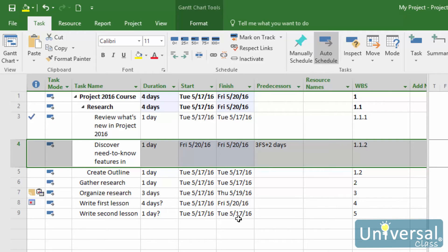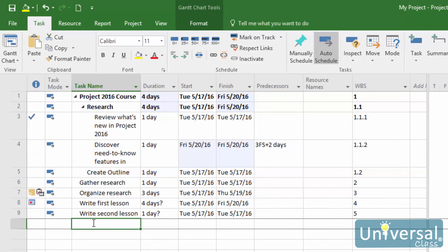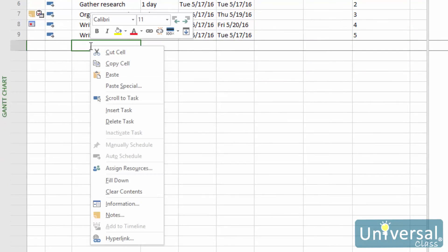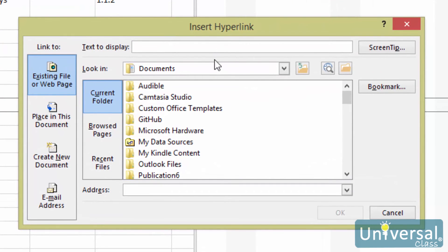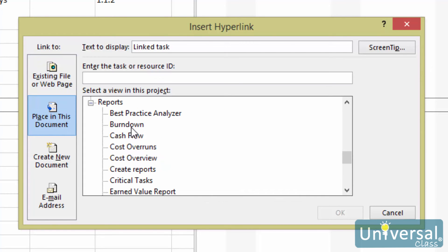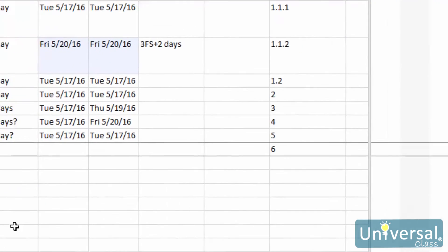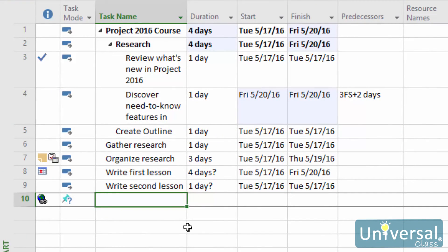You have to bring over timing and cost information yourself — it cannot be linked in from another project. To insert a hyperlink, select a blank cell in the Task Name column where you want the link to appear. Right-click and choose Hyperlink from the context menu. You'll then see the Insert Hyperlink dialog box. Type a name for the hyperlink in the Text to Display box. Next, select the appropriate file or web page, such as another project file, then click OK. A hyperlink symbol will now appear in the indicator field in the Gantt chart view — just click on the symbol to open your link.